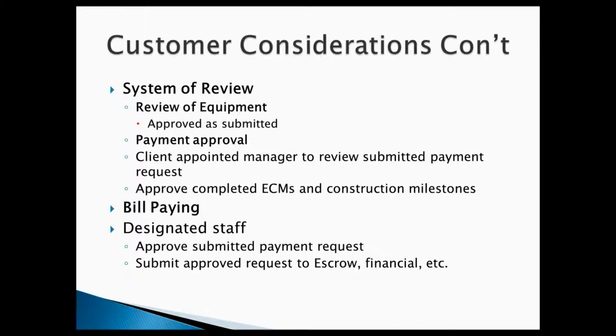How it works is the escrow submits a request for payment for a completed ECM or milestone, and you approve it by checking to make sure all the work is done, and you send it to the escrow or financial institution that's going to write a check and send it to the escrow.